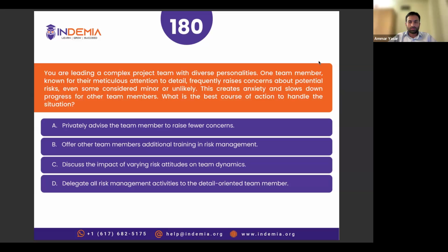All right. So Fahad, the problem with this approach is that the impact of risk varies from person to person. So maybe a $1,000 loss for person A is a small risk, and maybe the same $1,000 loss for person B would be a huge loss. You understand? Depending upon their financial situation. So attitude towards risk could vary. It could be different. That's why we study stakeholders' risk attitude. We talked about the concept of risk appetite, risk tolerance, risk thresholds.